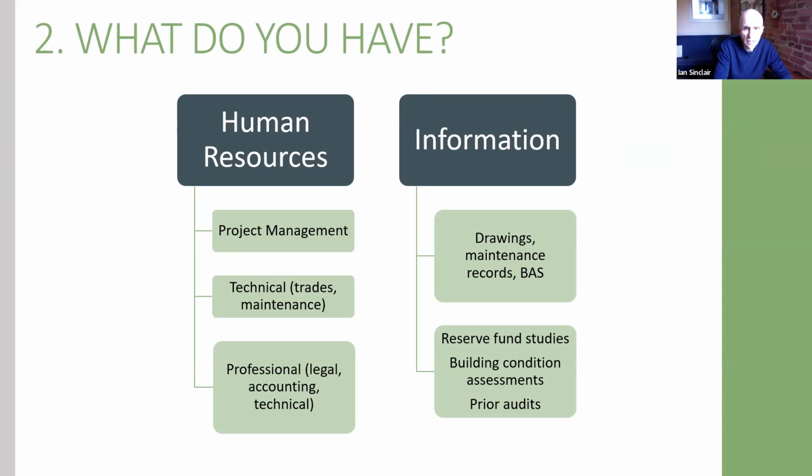If you have a building automation system and you're thinking about an energy retrofit project in the next short or even medium term, using that automation system to start running trends and plotting performance could provide extremely useful data for an external service provider coming in.